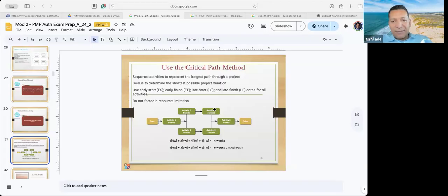So she can easily jump into it. But for this example, they're waiting before they both get to the next phase, which is activity 4 and activity 5. So that 1 week of waiting around is called slack. Also called float, because that's the time that you can wait.